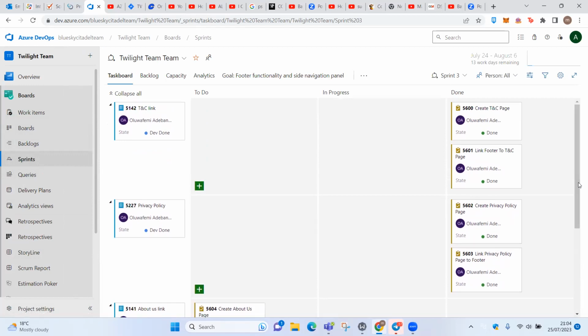All right, so Femi's task. Who is Femi in your team? Our developer. Okay, so make sure your developers are putting dev beside their title so that we know that's the developer's task. Right now, if I don't ask, I wouldn't know who Femi is. The name is there, but I don't know who the person is. At the title, where he puts create T and C page, if he does dev hyphen and then puts the title, I will know that's the developer's task. Edit it and put dev for him.